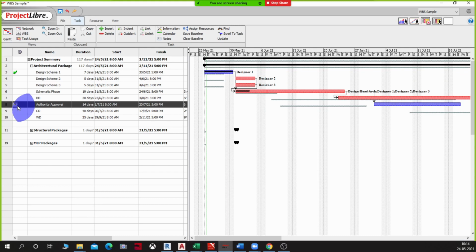So this way you can make it more and more concrete, so you can make it as realistic as possible. So certain people in the project are not available on a particular day, you can move the task to the day they are available and say that it cannot start before this day. You can also alter your calendar, which we saw last class. You can make a person's individual calendar different, right?